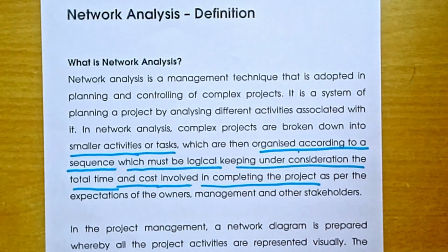So this is the sequence. You have to follow this sequence. And most of all, you have to arrange materials, you have to arrange the laborers for work, then only you can start work. Unless you get the material and labor, you cannot start laying the foundation and all that. So all these should be carried out in a particular sequence, one after one.